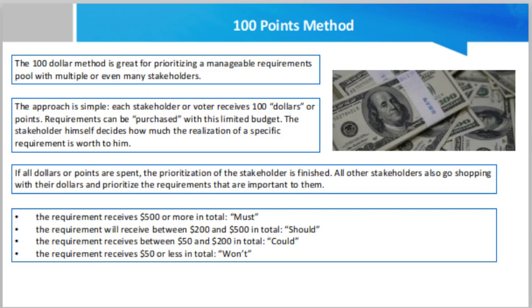Prioritization on a numerical scale. A widely used method for prioritizing requirements is to rank individual topics on a numerical scale, for example from 1, which is not important, to 10, really important. The higher the number, the more significant this requirement is within the product or project. In the best case, requirements have been recorded in tabular form and the weight can be added as a new column. This ensures filterability and sortability.